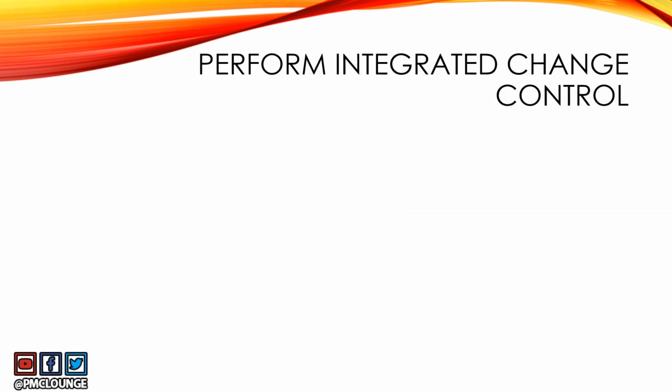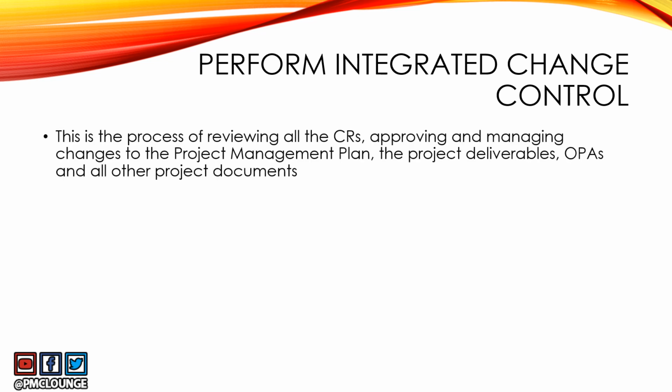Perform integrated change control again is a very important process. This is where you're reviewing all the change requests. You're also approving as part of the change control board, and you're managing changes. So once the change control board approves a change request, you are also managing any changes that need to happen as part of the project management plan as part of this CR, right?